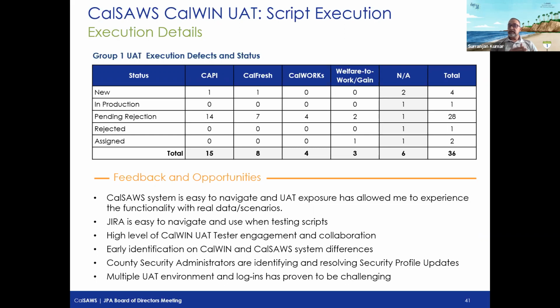As far as the processes go, we have used Jira as the test management tool this time in UAT, which allows the testers to have access to the test script, to the finding, to the defect, all in one place, which they have very much appreciated, because now they can see the progress and the development of a test scenario update in one place rather than going to multiple places.